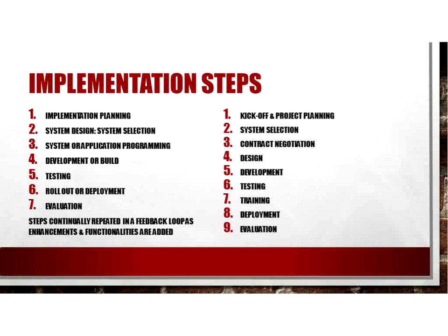Your development, you want to develop the system and build it, including the creation of your system files and all your organization specifics, like your numbering systems and those types of things. And then 6, you're going to test for each model and connections, making sure all those are working. 7, you're going to train your IT staff and your project participants while that system is being developed and built, and then train your end users closer to the go live time.